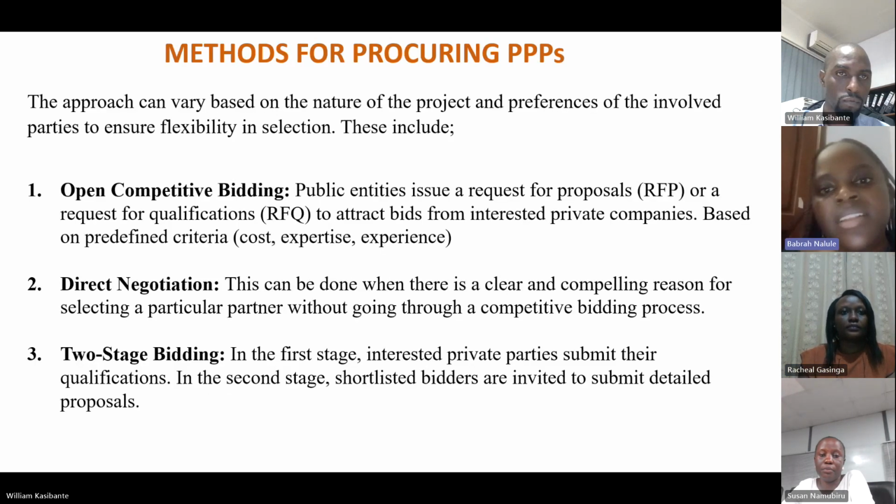We also have the methods for procuring the PPPs. The approach can vary based on the nature of the project and preferences of the involved parties to ensure flexibility in the selection. These include open competitive bidding, direct negotiations, and two-stage bidding.